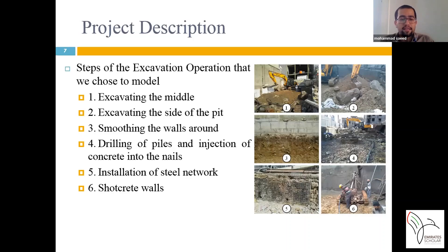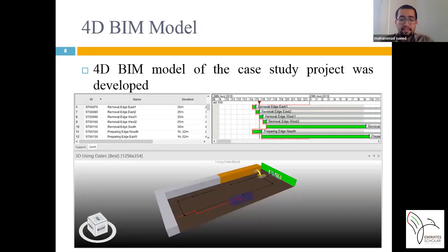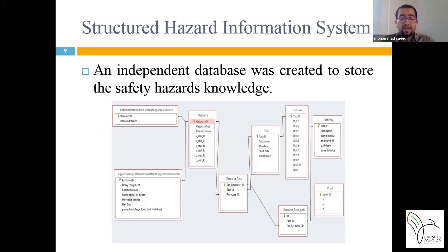The 3D BIM model of the project was created, and the schedule for the excavation and stabilization process was connected to the model. Therefore, a 4D BIM model of the project was developed. The figure shows a view of the generated 4D BIM model of the case study project. An independent database was also created to store safety hazard knowledge. We designed the database structure, including tables, properties of each table, and connections between them. The figure shows the tables, relationships between them, and their characteristics.